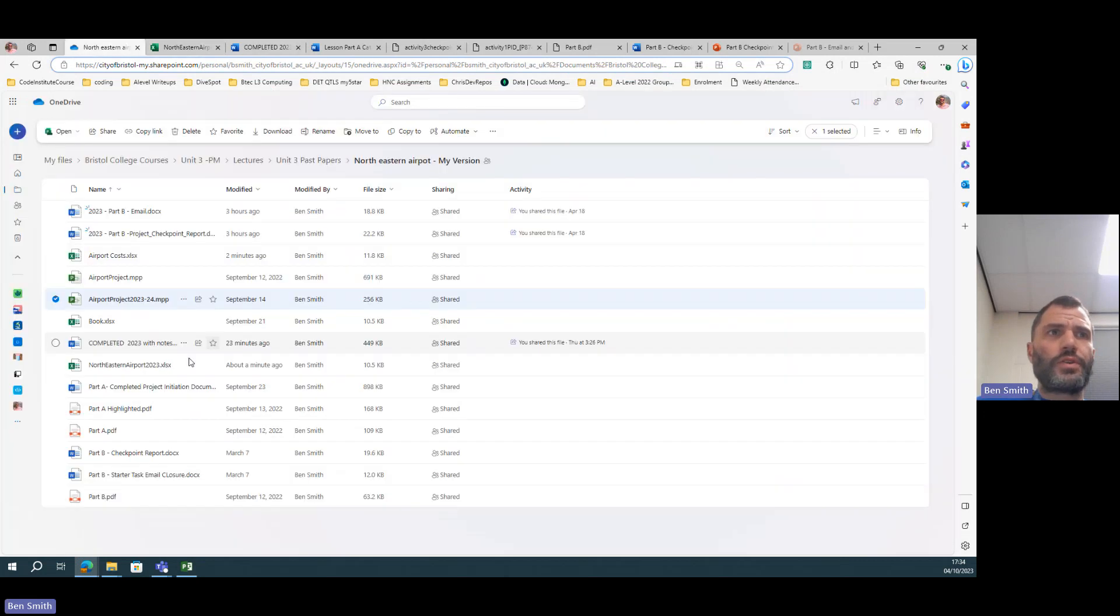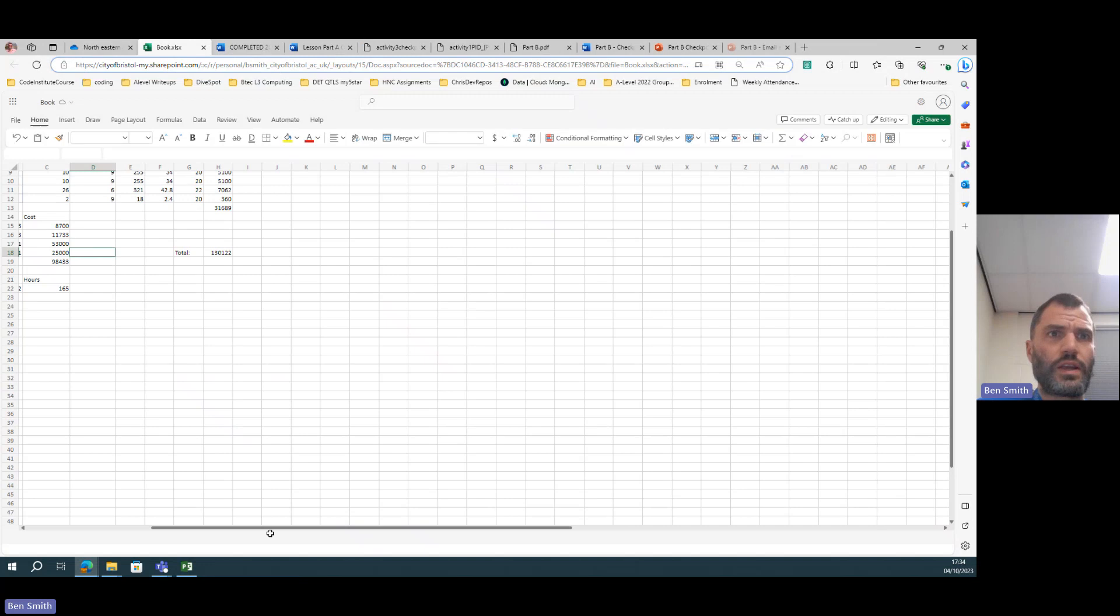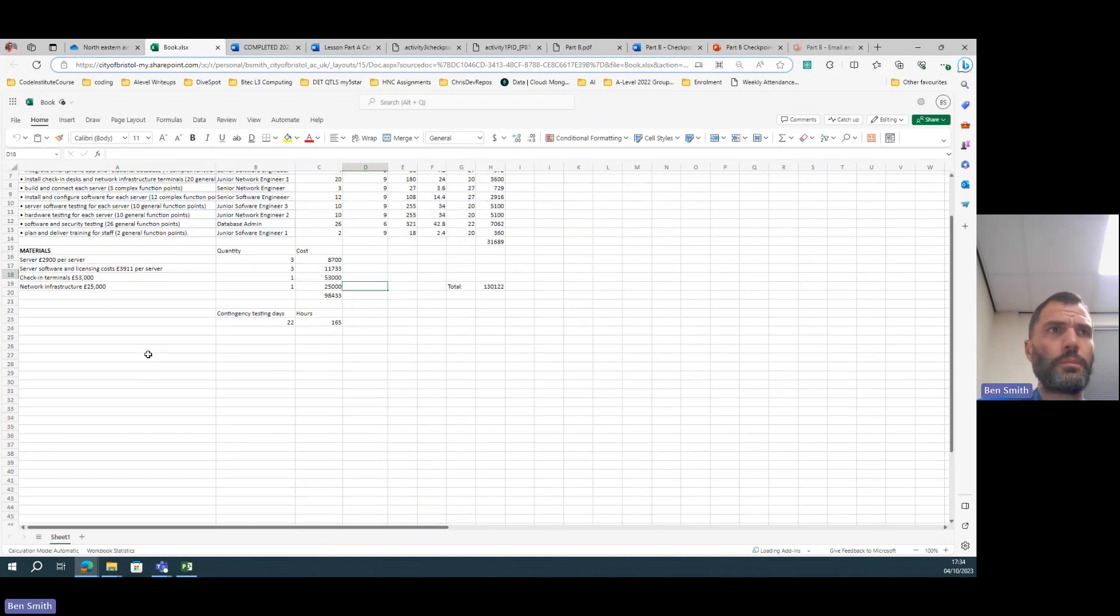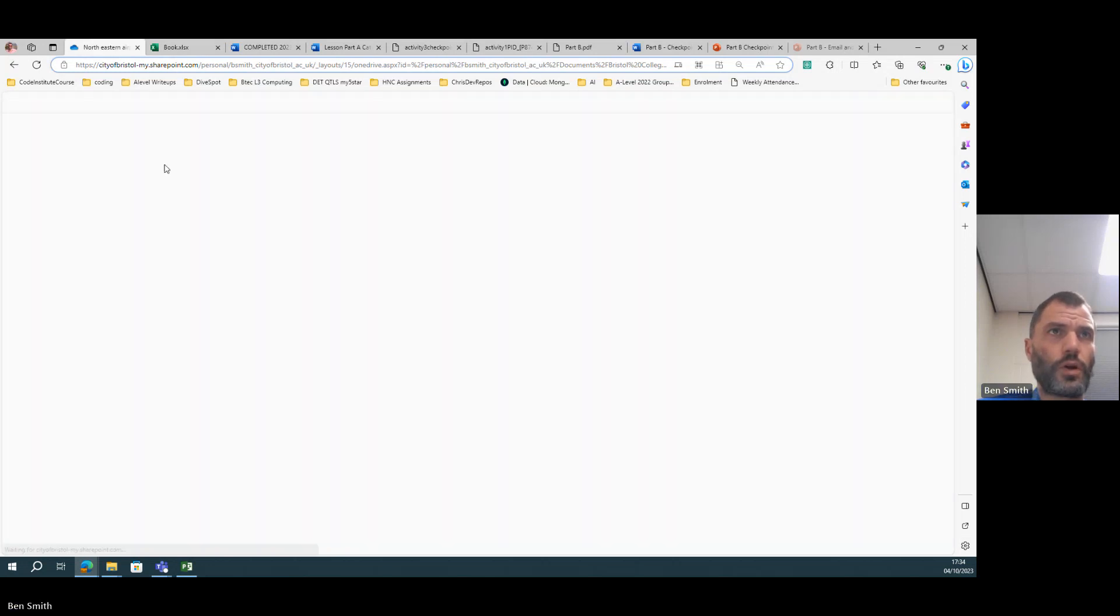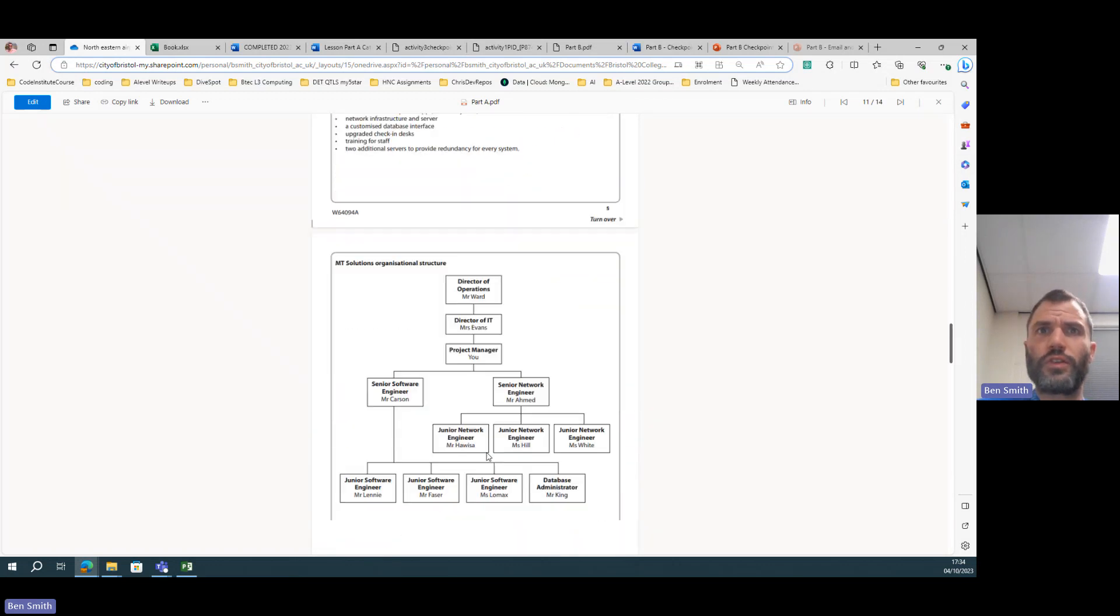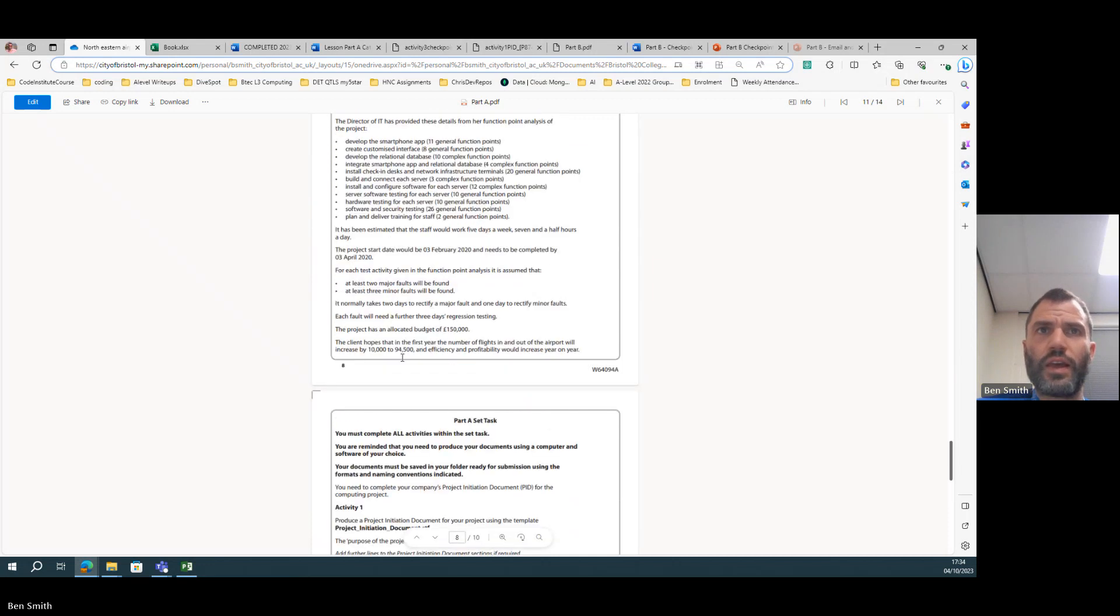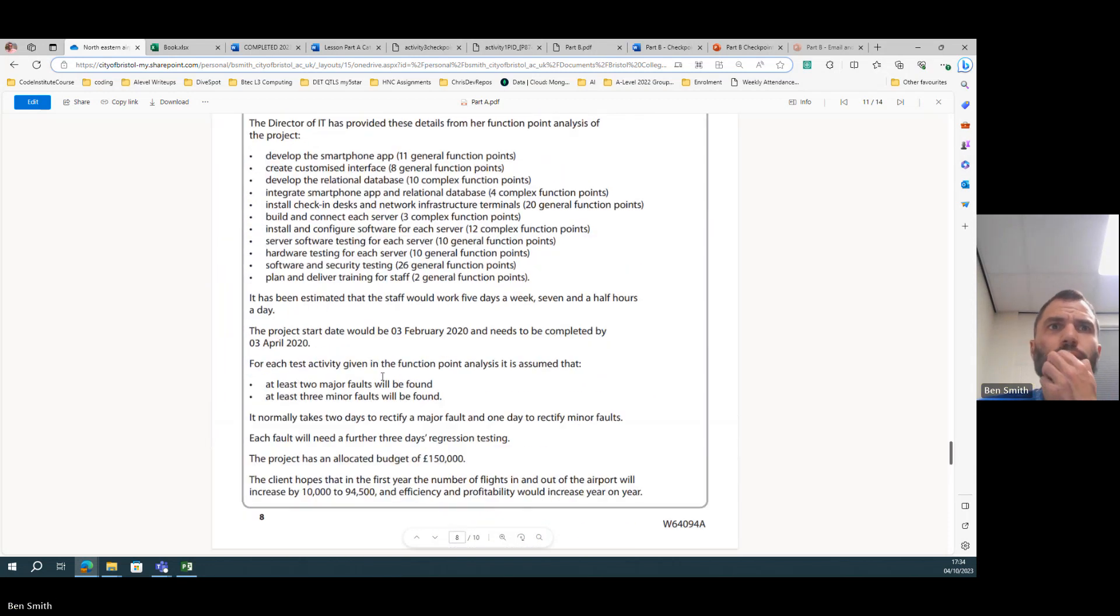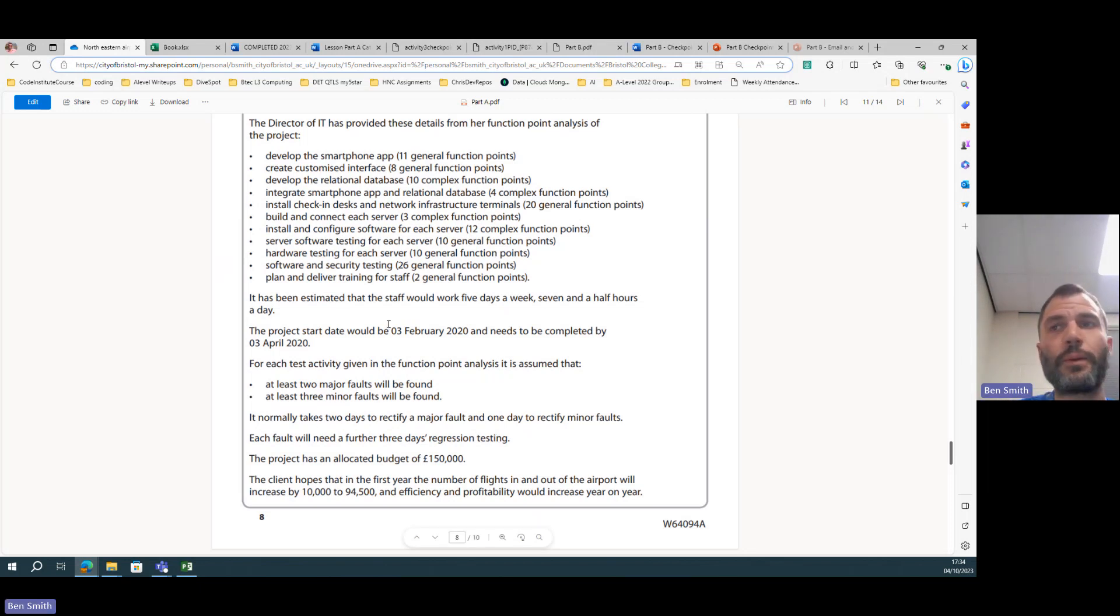If we go to where I've done the costings, I think it's in here. Basically the problem, as I noticed when we open up part A scenario one, is that it says for each test activity given in the function point analysis, assume that there are two major and three minor, and it will need three days of regression testing per file. Now if you calculate how many extra days that is, you have an extra 22 days or 165 hours, right.